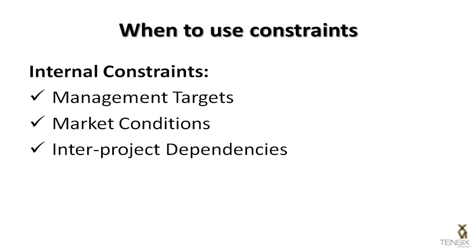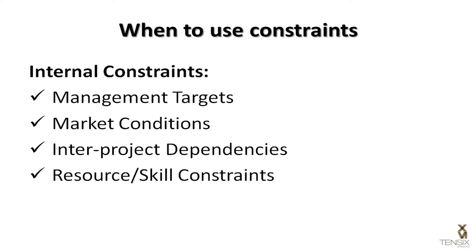Inter-project dependencies can be a factor when the deliverables from one project affect the start of work in another. Resource skill constraints refer to the availability of specialised personnel to perform certain activities within the schedule.